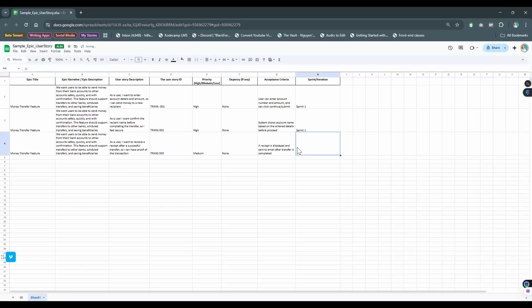So this is still under this point. I think you can put this under sprint 2, right? Let's say we are using every user story that is not a high priority, every user story that is minimum is under sprint 2, right? I hope this makes sense to us. So I'm going to give a few more and then we'll wrap this up.